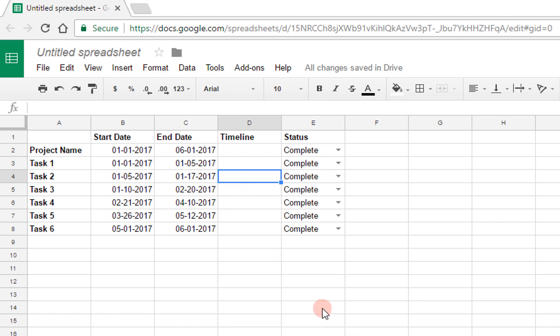Our whole goal here is to make some kind of a bar chart representation that's going to show where the task actually belongs in the overall timeline of the project, whether the task is complete or ongoing or still upcoming, and to represent that with various colors. To perform this operation, I'm going to use the Sparkline functionality in Google Sheets, which is going to allow me to create a bar chart inside of a given cell instead of making a separate graph.